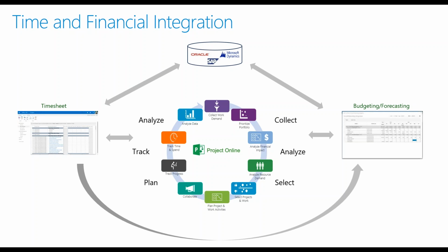For example, time reporting information on your projects and other work may be captured in a timesheet. Now, there could be rates in the project management solution, like in Project Online, that'll give you some early indication of what that labor cost may be that you're incurring. But things like real rates and procured costs and purchase order commitments and invoices paid and such will probably reside up in the financial system.